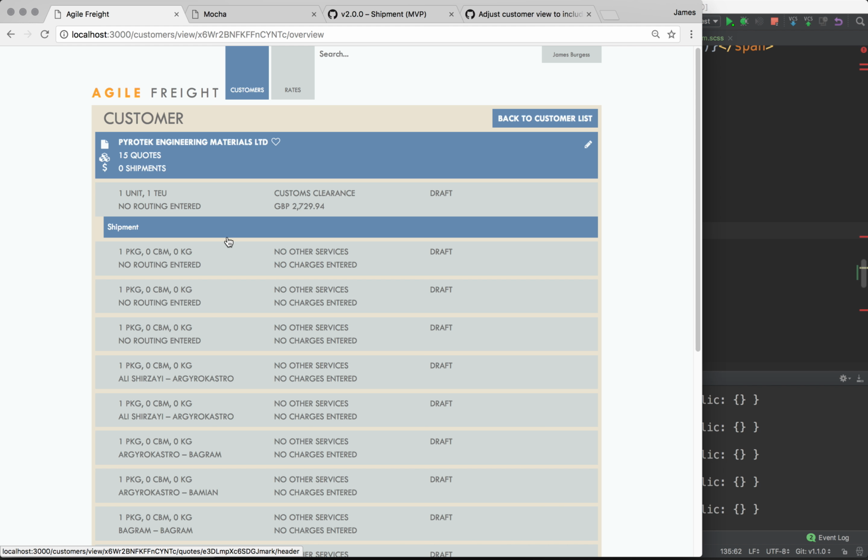And this whole Agile approach, breaking things down into releases, breaking the releases down into sprints, breaking the sprints down into product backlog items, breaking the product backlog items down into tasks, and then proactively identifying different tasks and breaking those down. It's all about getting to these tiny bite-sized pieces of work, things that you could do in 5 minutes or less. Nothing I've shown you has been more than a couple of lines of code, and really simple lines of code, in fact.